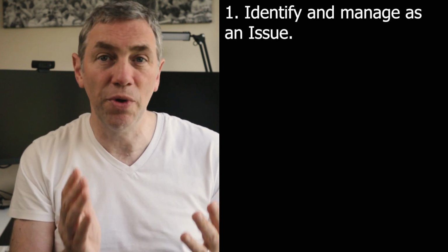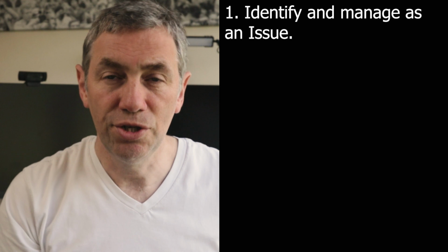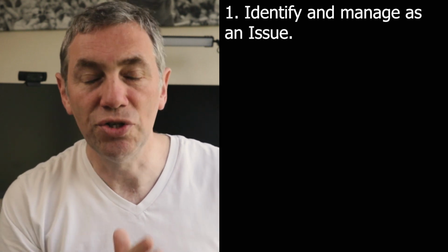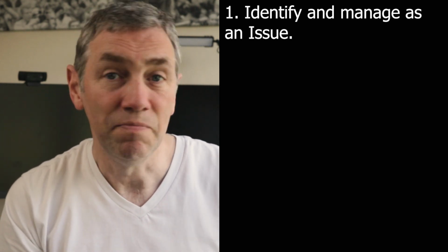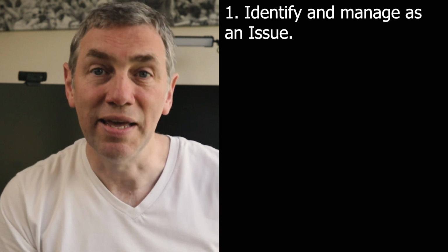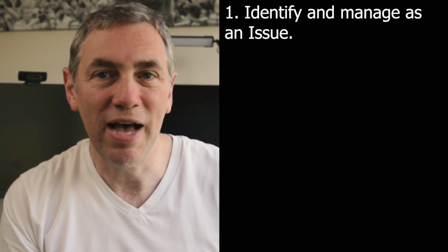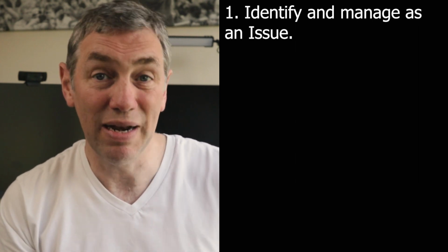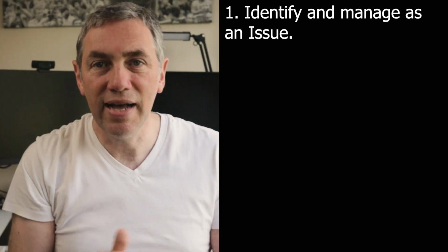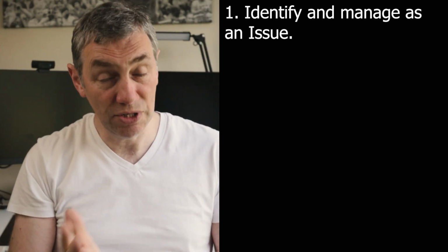I would expect that before you do anything else, you identify this problem as an issue and capture it with all the required detail in the issue log. Do some basic analysis of it to judge how big of a problem it is. In our example, it's a delay. Let's say that the supplier you have a dependency on is going to be late handing over a product to you. As a result, your project plan has shifted to the right.